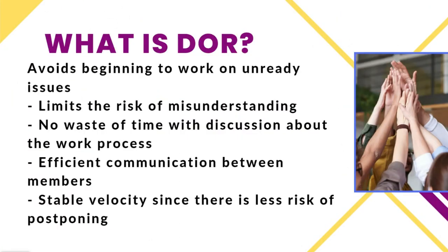So, what is DOR, definition of ready, right? It's a way to avoid beginning to work on unready issues. The worst thing you want to happen to you is to be inside the middle of a sprint and then you realize the story isn't refined, it doesn't have the right acceptance criteria, the business requirements weren't clear. Like that would not be good because now you have to stop and try to find another story and it's just really, really unpleasant, right? So you want to avoid that. That's what definition of ready is going to help you to avoid.